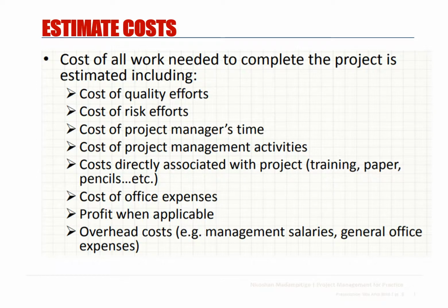So all that need to be estimated during the estimate cost process. The other thing that you need to consider is overhead costing. Example, salaries paid to the shared services, management salaries, general office expenses. All that have to be included into your project or product cost estimates.